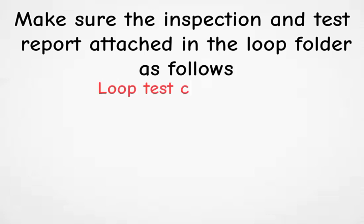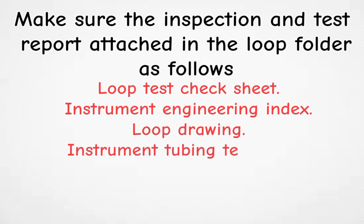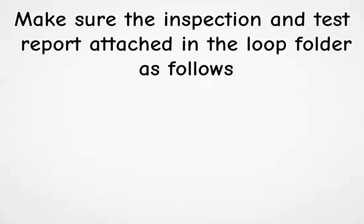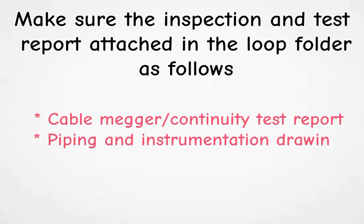Loop test check sheet, instrument engineering index, loop drawing, instrument tubing test report, instrument data sheet, instrument calibration report, cable mega continuity test report, piping and instrumentation drawing, and punch list.